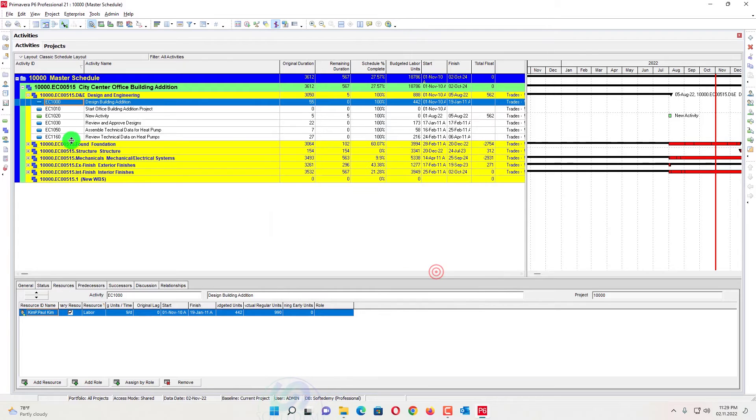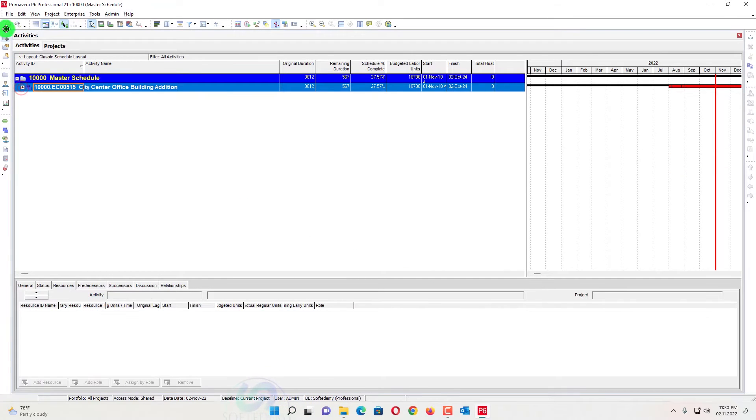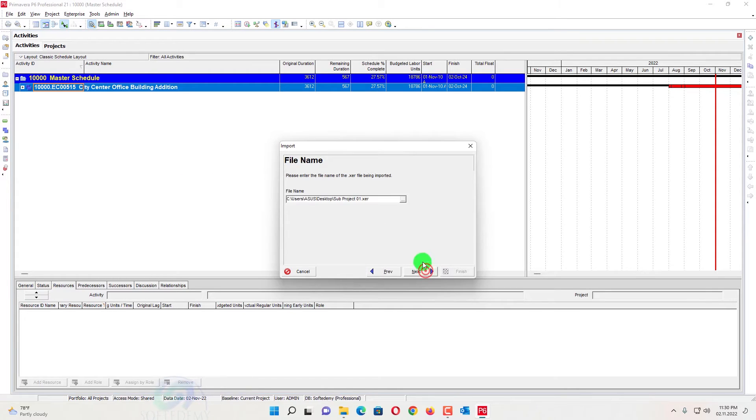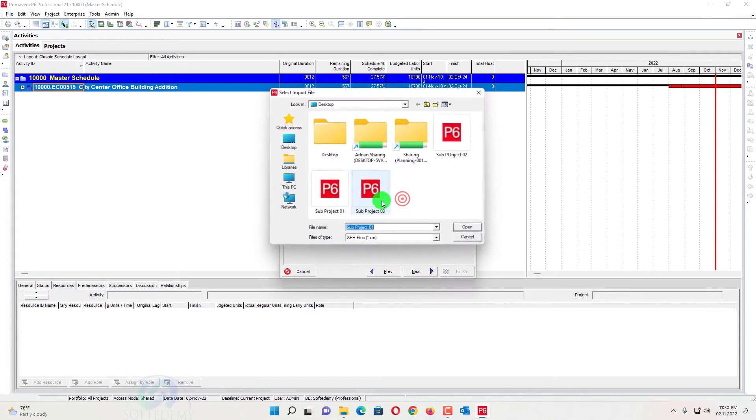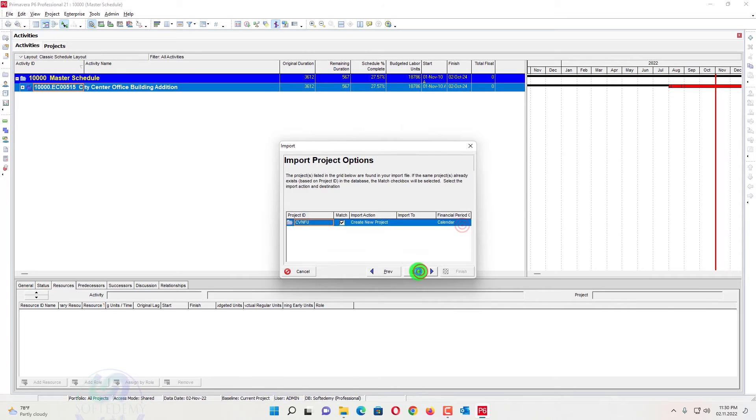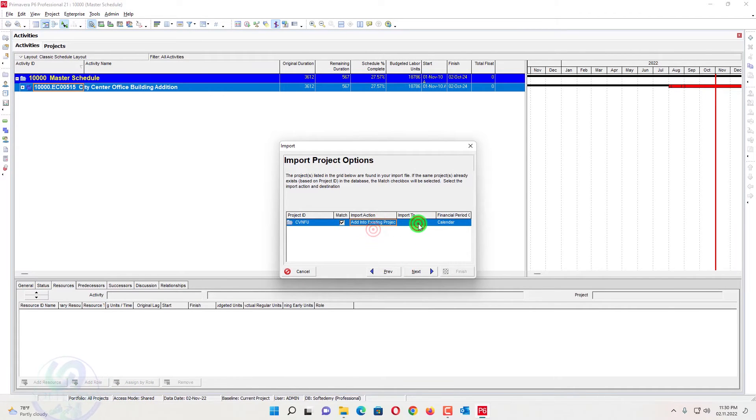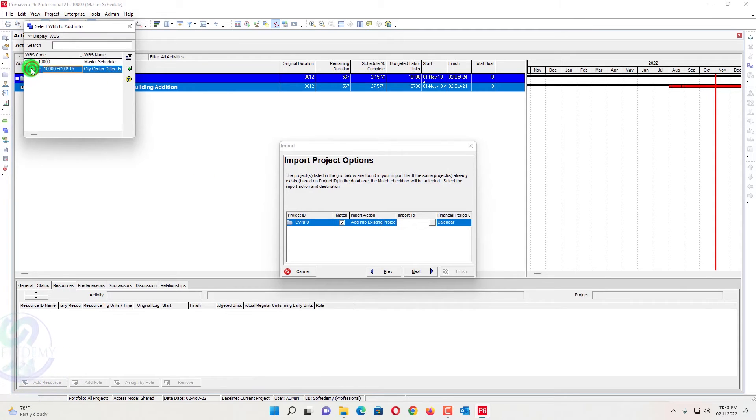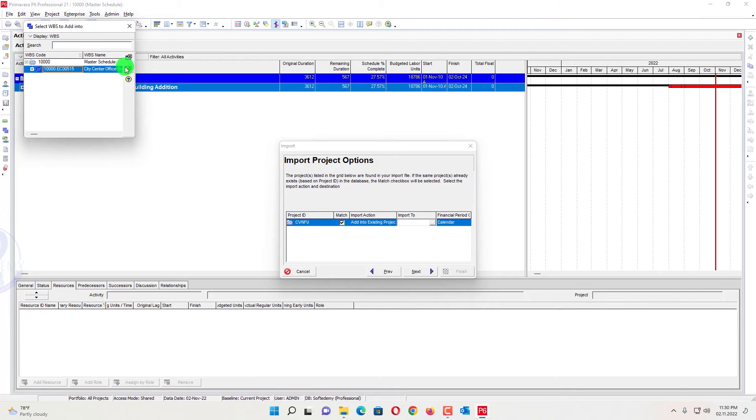So next one, the first one has been added now. Now I will go import, next, next, next. Here I will select the project number two. Open this one. Next, I will add into existing project.